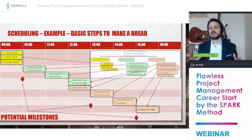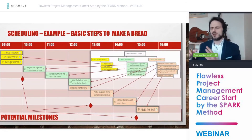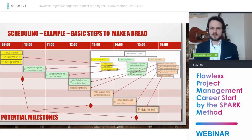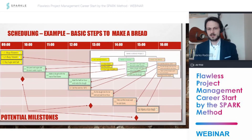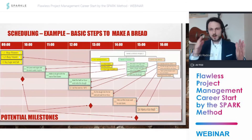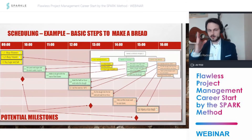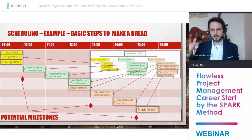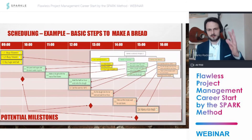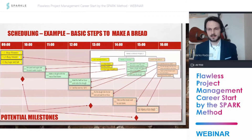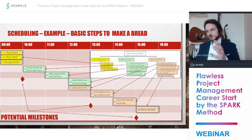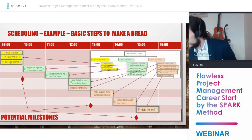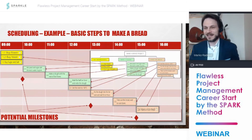The work breakdown structure gives us excellent information about what needs to be done, but only with a schedule and careful analysis can we know how long things will take. Throughout the project, you can have important milestones — moments in time when you can say: 'I bought all ingredients, so the yellow area is completed' or 'I made the dough, so the green areas are completed.' This is how you map your work breakdown structure to the schedule.